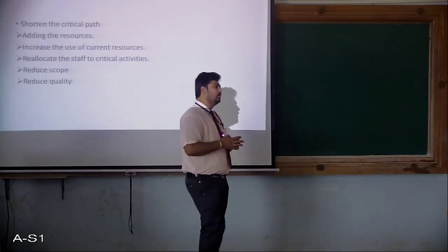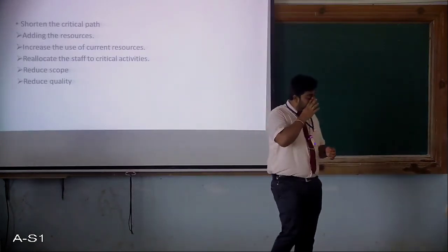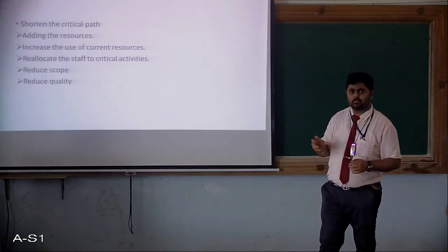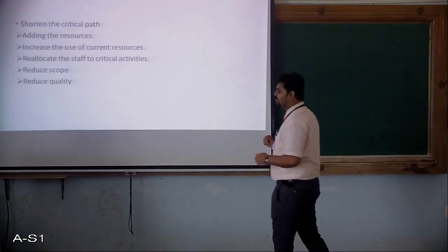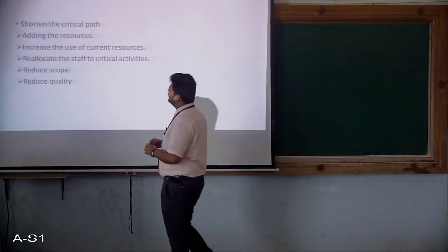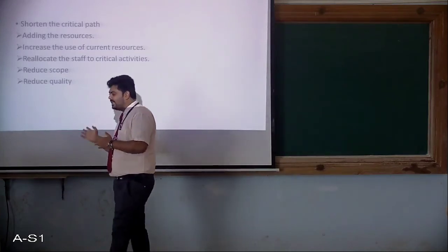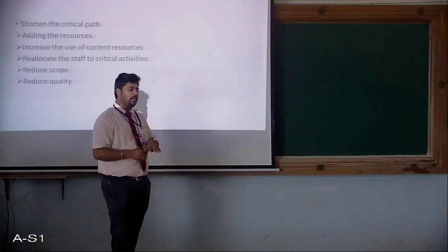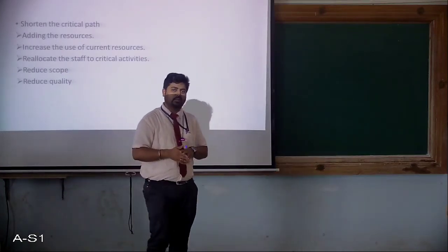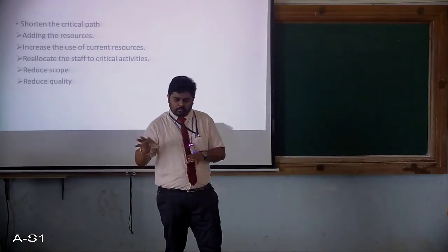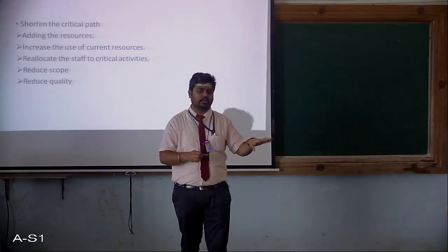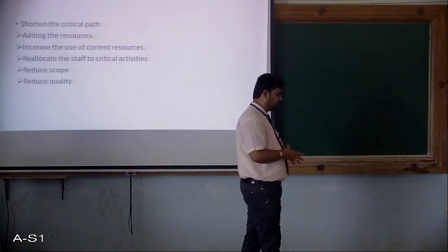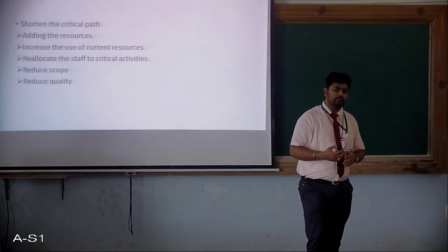Here the non-critical activity means you have some buffer time or some modifications you can make, so there is no problem with your non-critical activity. From that you can take some resources and allocate them to the critical activities so that it will work properly.